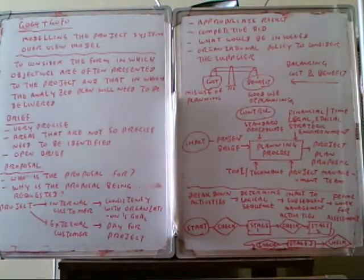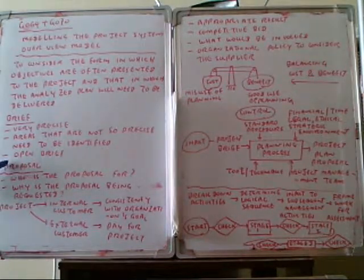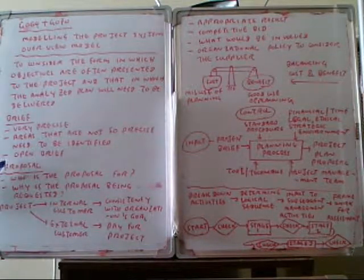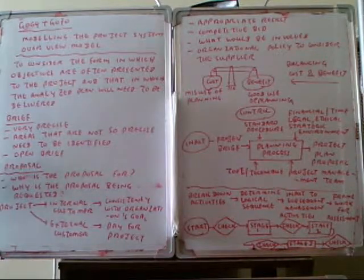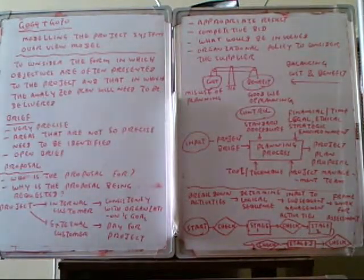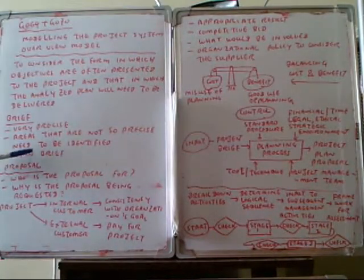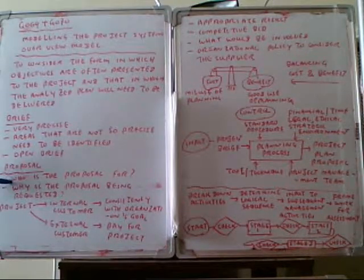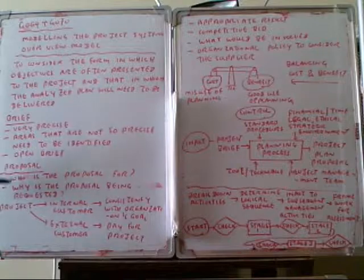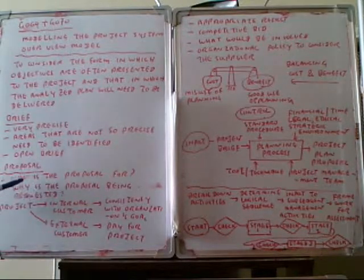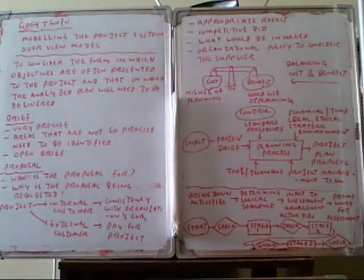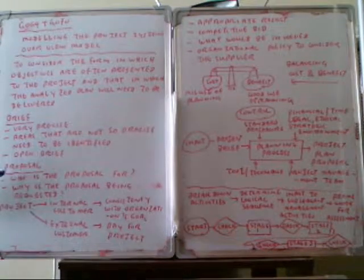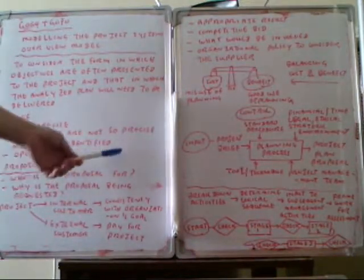After you finish the brief, we have to write down the proposal. In this case, how to do the project, how long we're taking, how much money will be causing, those must be included in the proposal. The important thing that has to be considered is who is the proposal for, and why is the proposal being requested. These two things have to be concerned.